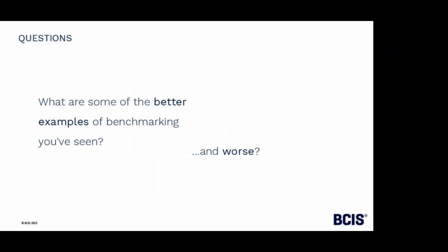So the first thing we had to do was agree a series of workshops and agree a structure. So we set what we wanted to capture against these different items that they had. Then we set up the process of actually starting to get the data in.